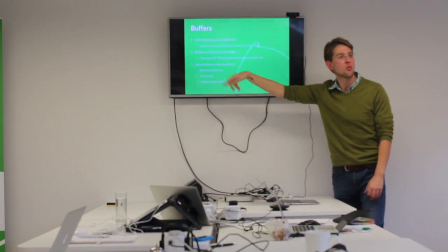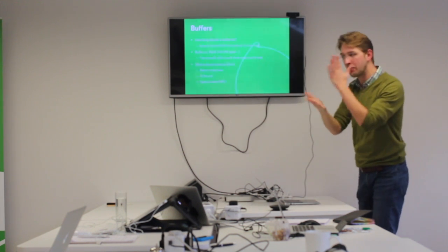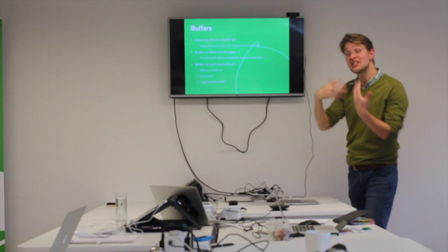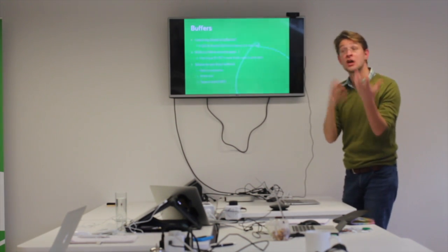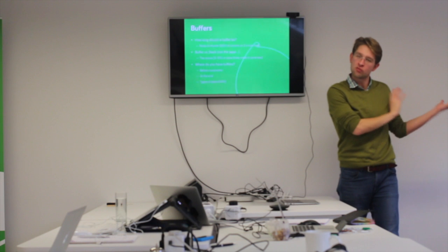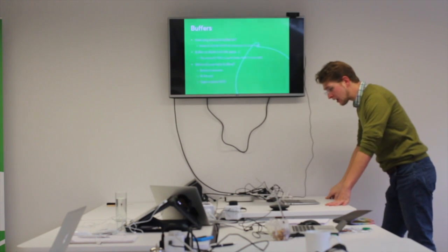So 5 to 10% of the work is going to get finished in there, but you're expecting most of the work to have got done by that point, by let's say day 6 out of 9, and to be sitting in front of the bottleneck waiting. So the bottleneck is always in use. The bottleneck is never turning around, ready to work, and there's nothing to work on.